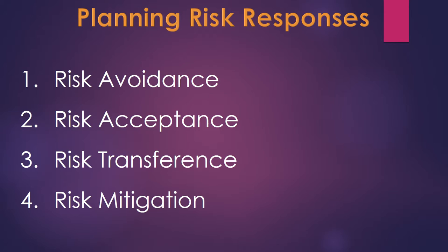Risk avoidance, a lot of companies try to avoid any kind of risks. In other cases, there are some risks that cannot be avoided and you just have to live with them. You have to accept the risk. In other cases, you can transfer the risk. You can hire a consulting company, or you could buy insurance. In all, the main objective of planning risk responses is risk mitigation. All projects have risks, and not all risks can be avoided completely. So the main goal is to mitigate the risks, so that if they happen, the effect is not so big that it will have a very negative impact on the project.